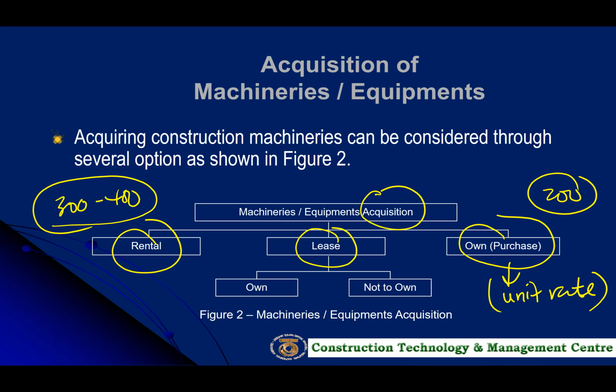How about lease? Lease is basically similar to rent, but normally we use the terminology of lease for a longer period of time. We do not lease for simply 1 hour or 1 week. Normally, lease is associated with a longer period. Maybe you lease for a few months, years, etc. That is the concept. And even with lease, there could be an option at the end of the day, after you already leased the equipment for a few years because you do not want to purchase.